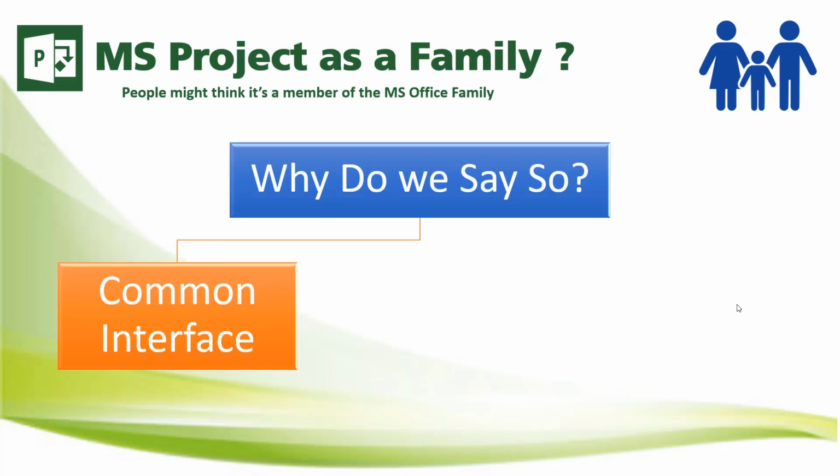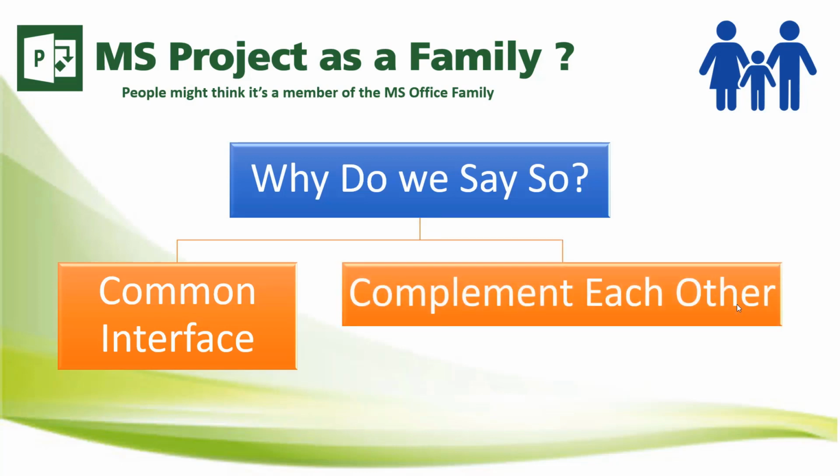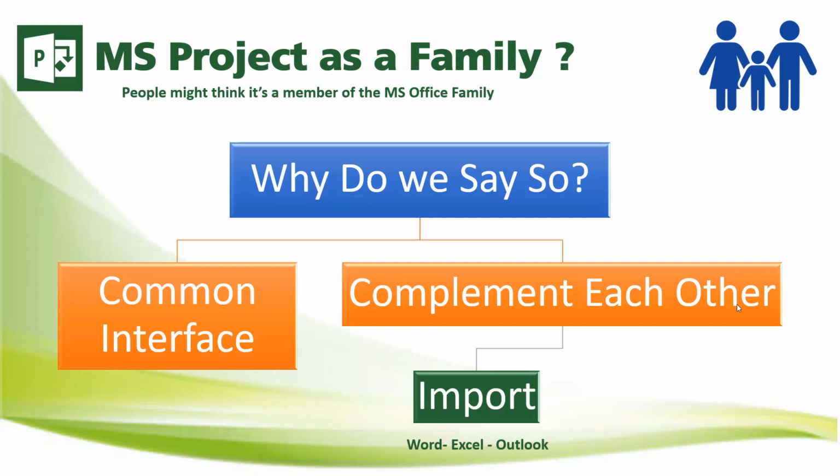The second reason for saying it might belong to the Office suite of applications, although it doesn't, is that they complement each other. They can be integrated with each other. So if some members of your team do not have Microsoft Project and have already started planning a project by creating a list of tasks in Word, in Excel, even in Outlook, you can import this list of tasks, or import the list of contact people or resources from Outlook. Or you can do the opposite.